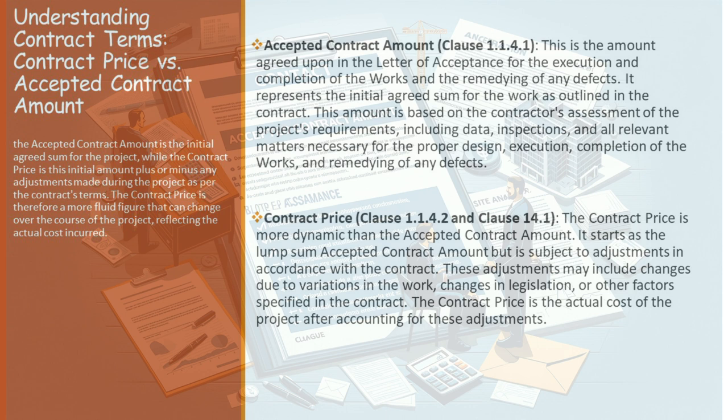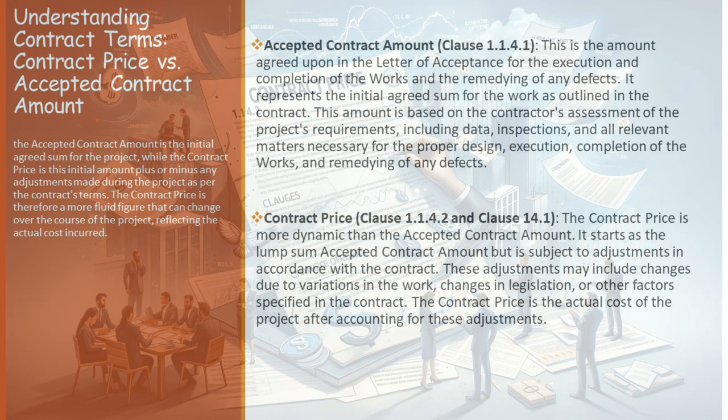But how does this adjustment happen? Let's dive into some of the clauses that influence these changes. Clause 14.1, for instance, sets the stage for these adjustments. It states that the contract price shall be the lump sum accepted contract amount, subject to adjustments in accordance with the contract. This means that the initial figure is not set in stone — it's a starting point, a base from which the actual cost is calculated.